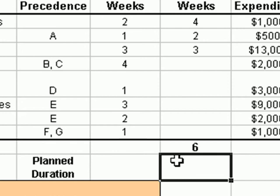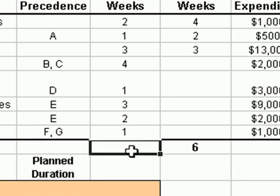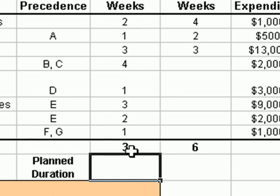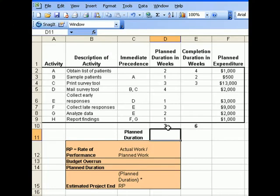Now let's go to the planned work. Again, looking at the first three activities A, B, and C — A and B fall in the critical path. Again, we add only the number of weeks for A and B, and those numbers are 2 plus 1. Remember, when calculating the rate of performance, focus only on the activities that fall in the critical path.